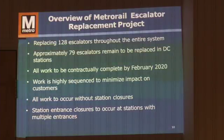There have been some other proposals, such as weekend work, to help expedite this. We explored that opportunity as well. But what happens when we looked at that is the congestion we would have on Connecticut Avenue on the weekend. You've seen the proposed traffic plan that we had up there. You can imagine that on a Friday evening or Saturday morning, it would cause chaos. The bus traffic would have to be rerouted to the old bus stop behind the UDC. You're just talking total chaos if we were to work during the day. Now, if it was opposite of Connecticut Avenue in some form or fashion, I think we have an opportunity.